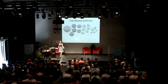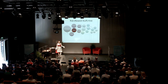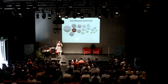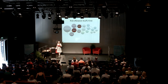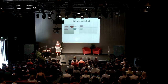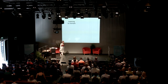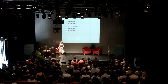The trick is to do the riskiest stuff first — the stuff you know least about. Find the stakeholder whose goals you've never ever delivered to — that's most likely to stop you. If you can't find one of those, the product owner's goals — the person who fought for that thing, fought to get the budget and the team together. Find the capability that's newest, the one you know least about. Break it down — just get one scenario out. Exploring by example is the most important thing you can do in BDD.